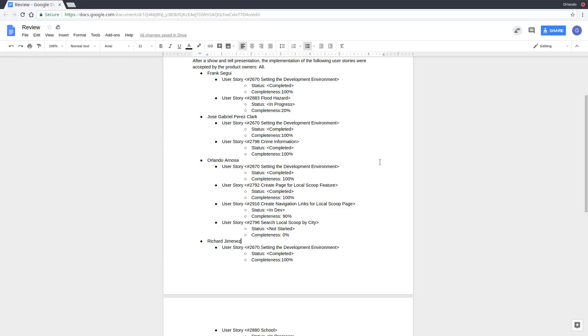Unfortunately, I was not able to get started on 2796, which is Search Local Scoop by City. We need to be further into development before that UserStory can be started.